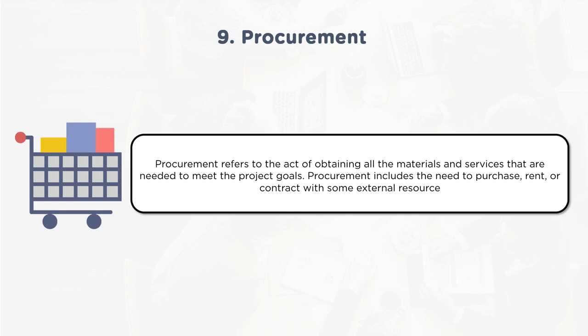Another type of contracting can be time and material, where the billing will happen based on the amount of time one spends on that particular hire, or a resource onboarded on a time and material basis, and what effort that resource has put in. Based on that, billing will happen. So three types of contracts, depending on the different scenarios of the project, will be signed with the contractor.